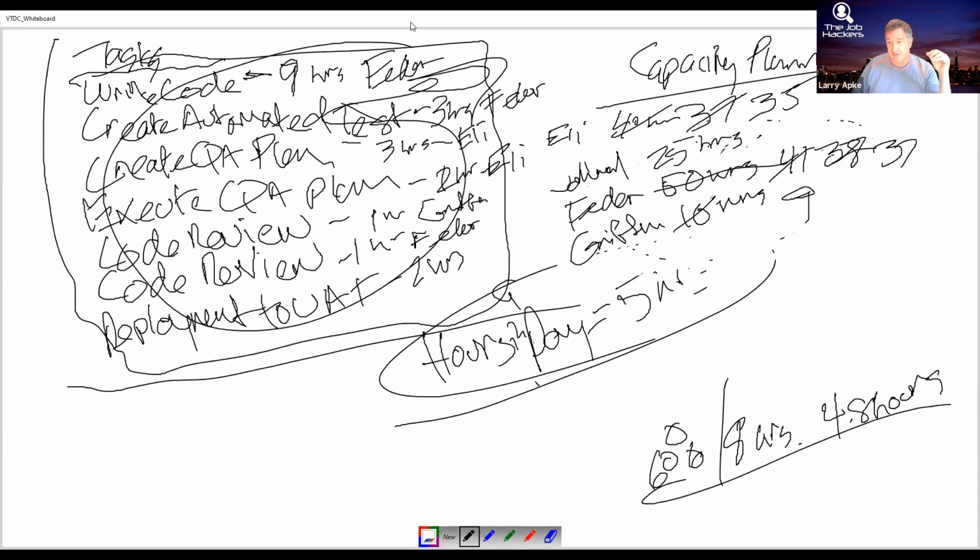And so what did they do? Well, they did what most management folks do, unfortunately, is they didn't really think through the thing too much. And they said, let's just hire more developers because developers develop software. And in a way that makes a little bit of sense. But what they didn't do is they didn't realize what the problem was. And when we went and started breaking things down into capacity planning, what we found out is they didn't need developers. They needed people who could do the QA because they didn't have enough capacity for QA.